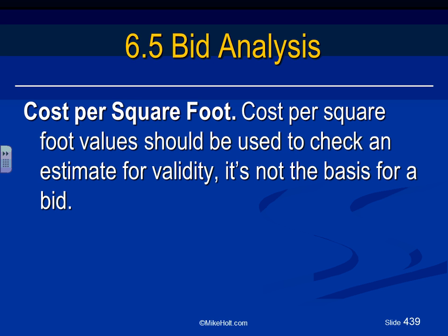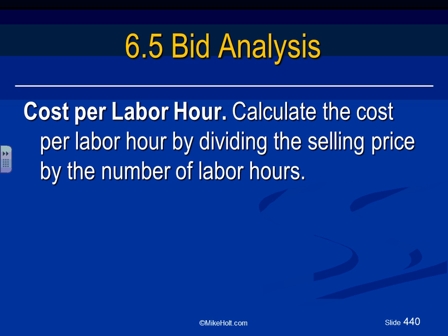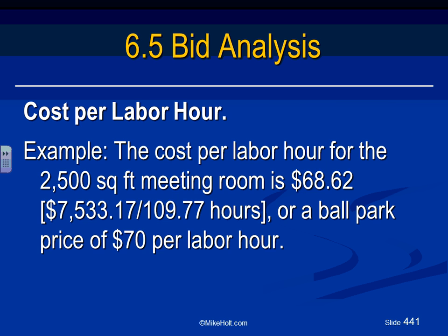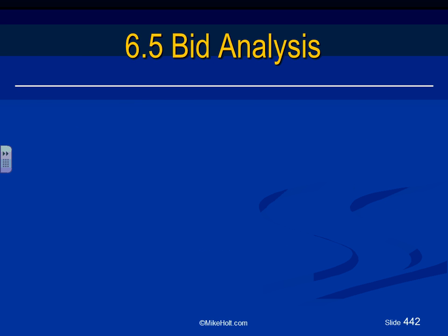Again, it's analysis, not to validate the estimate, not to do the estimate. Cost per labor. We talked about this one, guys, too. You take all your selling price divided by how many man hours or woman hours you need, and it gets you the average dollar value per labor. Well, gentlemen, that will also be an indication of whether you have accounted for every labor for every component in your project.